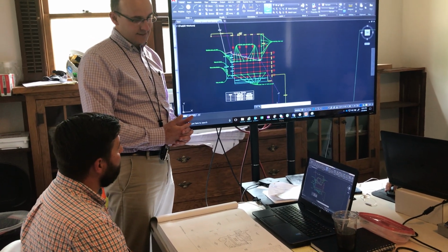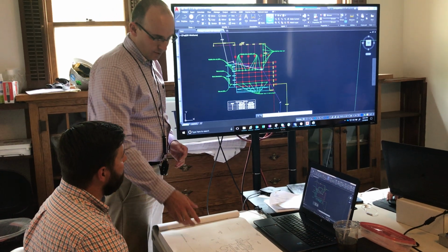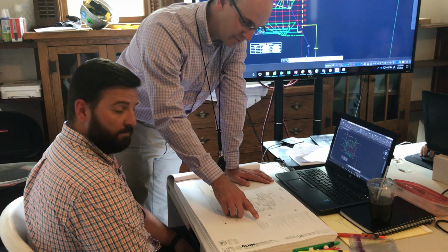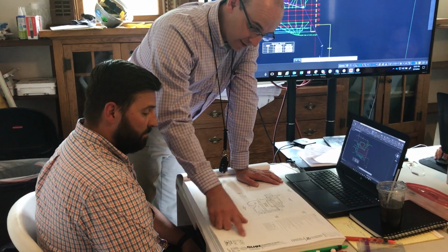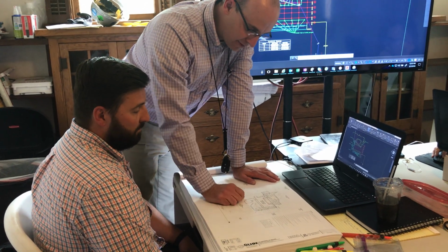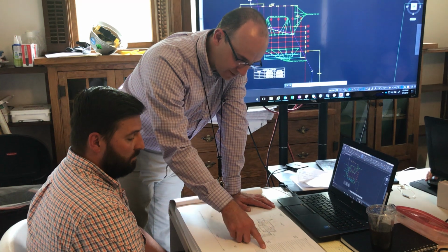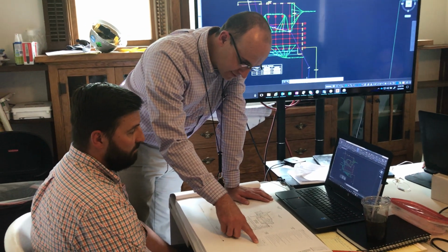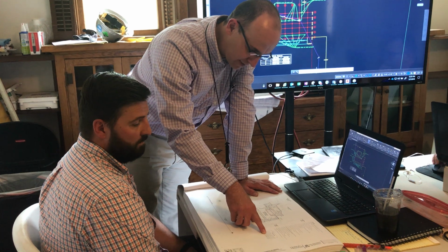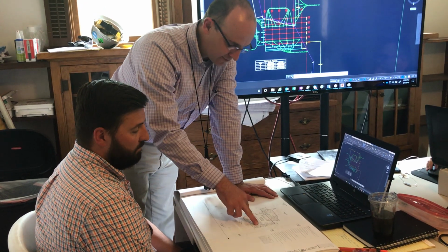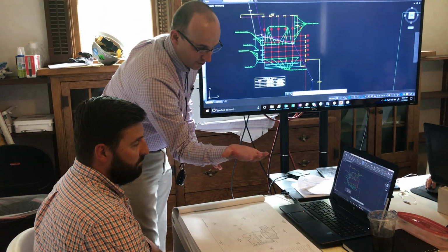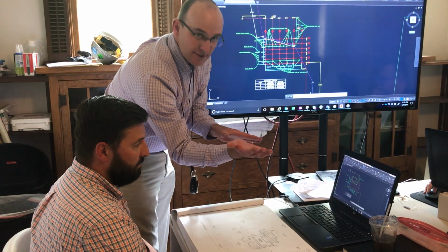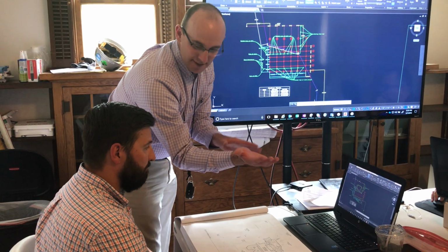So basically, when you look at, and I don't know if you can see this, and you don't have to zoom in too much or at all, but on CS 101, basically the front matter of the civil drawings, it has a point table, and it says grid line 10.1 and 1.7, here's the coordinate, 6.6 and D.9, here's the coordinate. So it's given us 4 coordinates, but those coordinates will tell us where our new building is. How do we know that it fits and ties into the existing? Does that make sense? Mm-hmm.